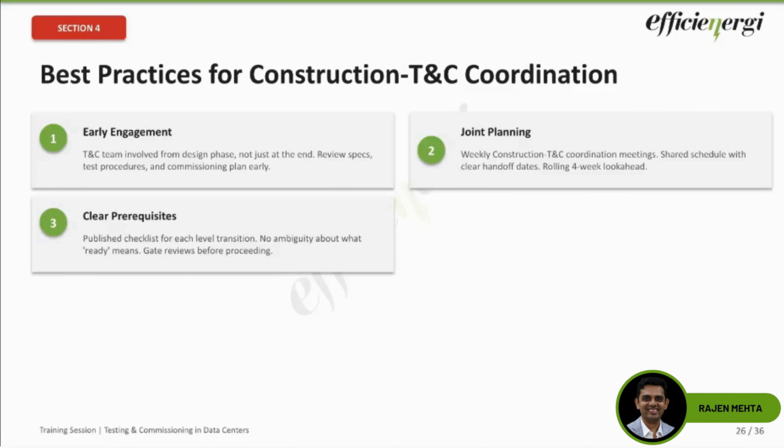The ready definition should be through a checklist only. There should be a checklist for every level transition, right? You gate the reviews, meaning every sign off should be gated. It should be through a review only, no exceptions.